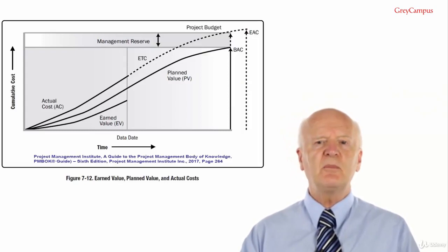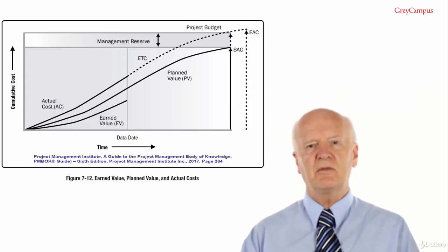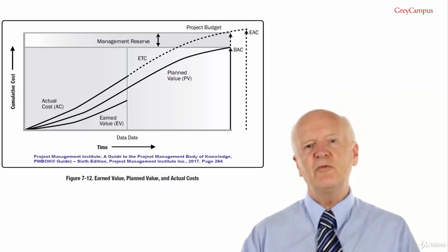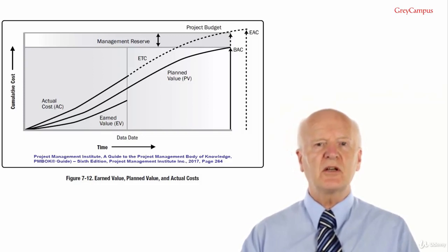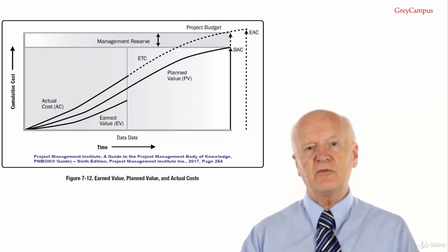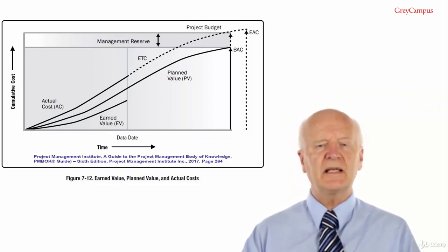The next earned value analysis technique is trend analysis, which examines project performance over time to determine if performance is improving or deteriorating. Examples of trend analysis include charts. These enable planned value, earned value and actual cost, the earned value analysis variables, to be easily monitored and reported for each period, typically weekly or monthly and on a cumulative basis as well. Figure 7-12 uses S-curves to display earned value data for a project that is performing over budget and behind schedule. Forecasting.